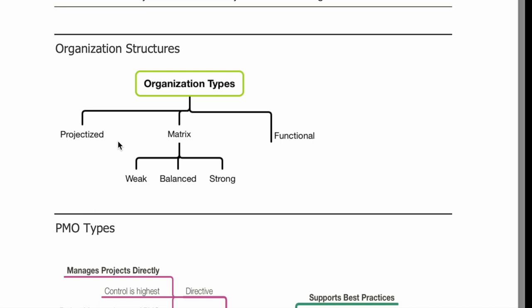Portfolio manager also decides on what kind of organization they want to run with based on the kind of work. A portfolio manager may decide to have a projectized organization or a matrix or functional organization. What is projectized? The one wherein the PM is the boss of everybody. Functional, the one where the operations or functional head takes the people in. And matrix is a combination of both. You would have two reporting bosses here.